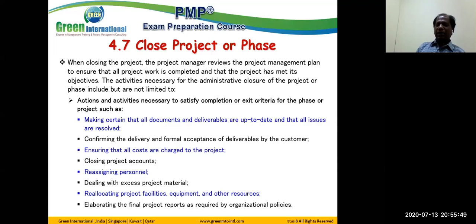Actions and activities necessary to satisfy the completion or exit criteria of a phase or project, like making certain that all documents and deliverables are up to date and that all issues are resolved, confirming the delivery and formal acceptance of the deliverable by the customer, ensuring all costs are charged to the project, closing project accounts, reassigning the personnel, dealing with the excess materials, relocating the project facilities, equipment, and other resources, demobilization, and elaborating the final project report as required by the organizational policies.